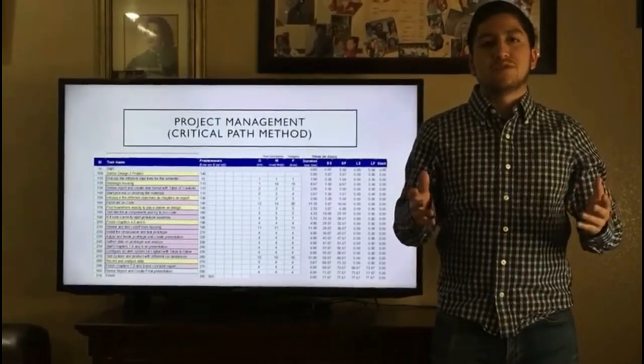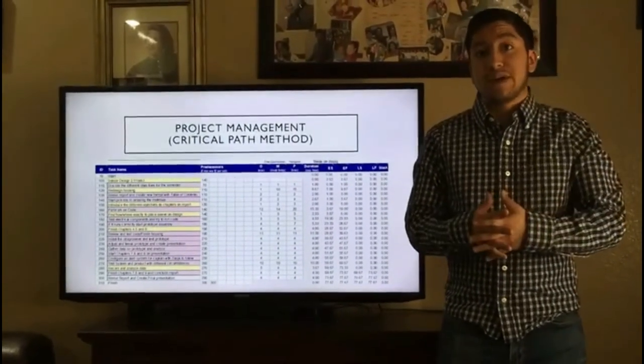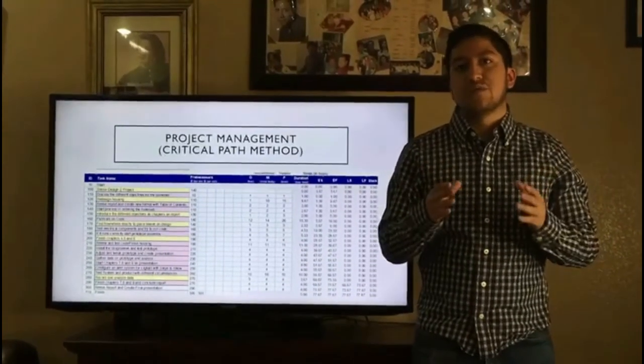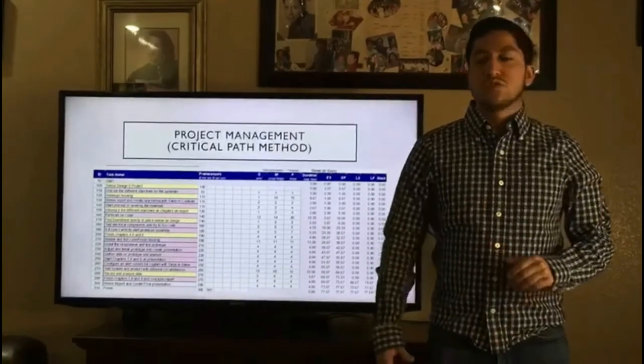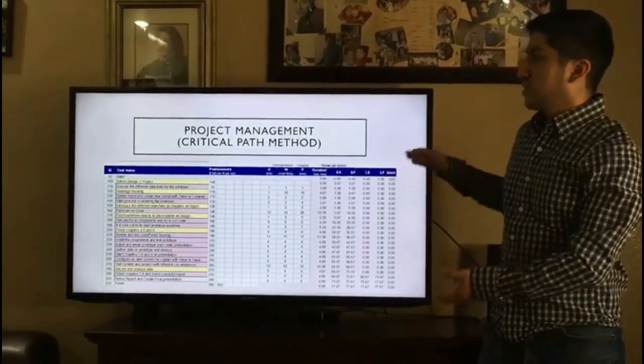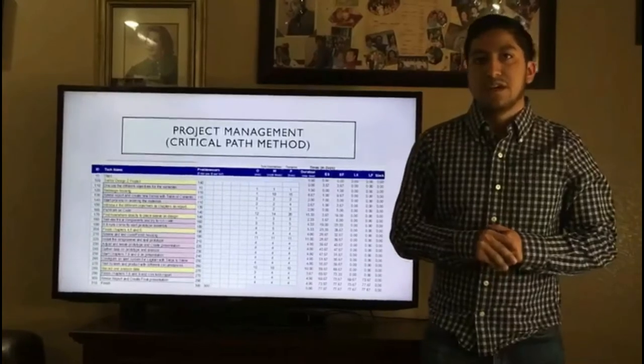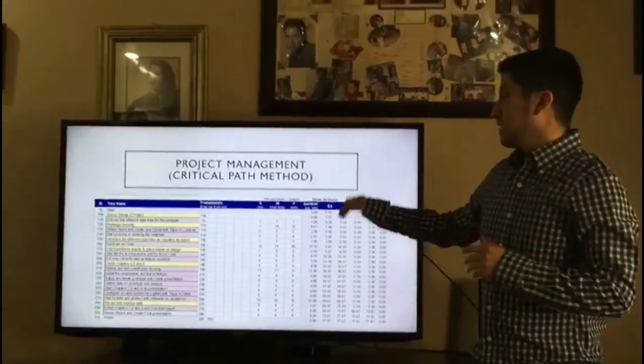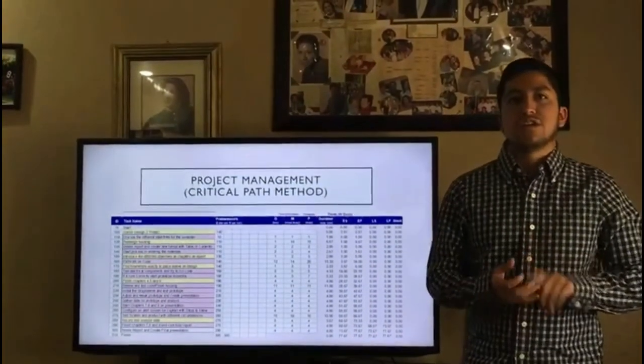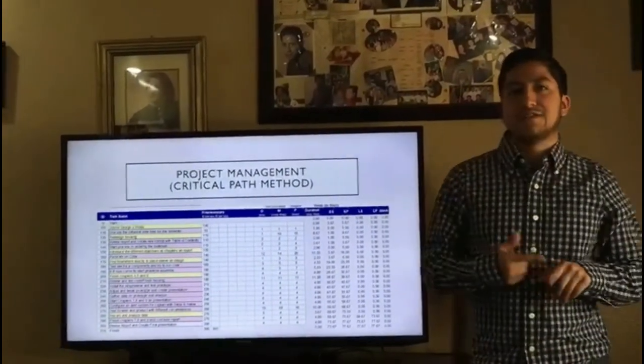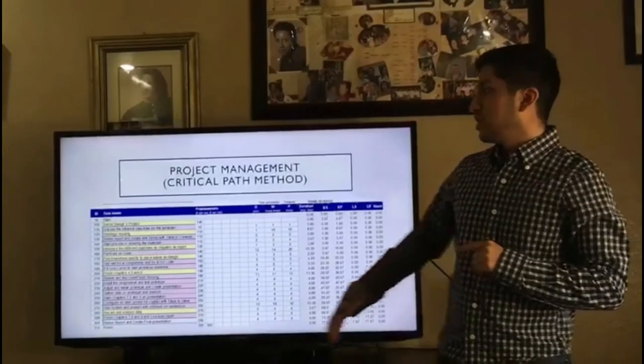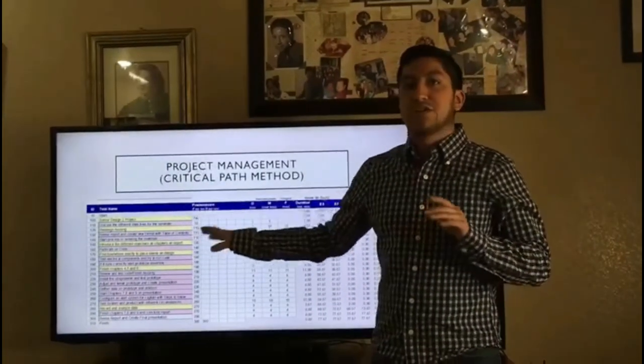To map out our semester, we had to make a critical path to see what's the best way we can reach our goal to create the prototype. For the critical path method, this was the table we obtained. It includes the slack, early finish, early start, late start, and late finish. It also includes the predecessors.